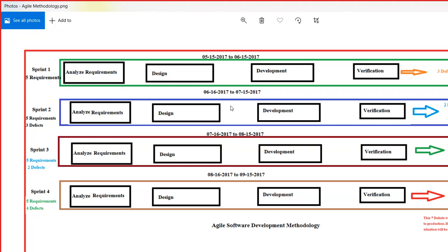So we have a key discussion today: agile methodology and waterfall methodology. In waterfall methodology, we develop everything together, and then we test everything together. We analyze, we prepare the requirement. Once the requirement is prepared, design will be done. Once design is done, design is sealed. But in agile methodology, the owner of the project might come and say, actually you have to change this design.